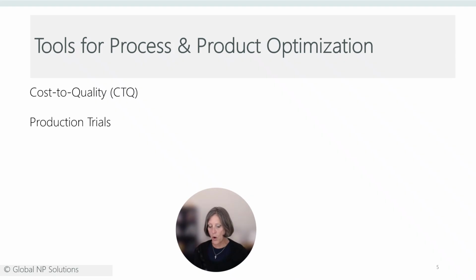Most new products will require manufacturing production trials. A production trial will test that the factory required equipment performs as expected and that quality tests accurately measure the correct product functional variables. Pilot tests provide data for engineering design, but there are frequently different issues that arise under real-time conditions. It is important that the engineering designers and manufacturing personnel are present in at least one of the process and product optimization workshops to offer feedback on production trials.